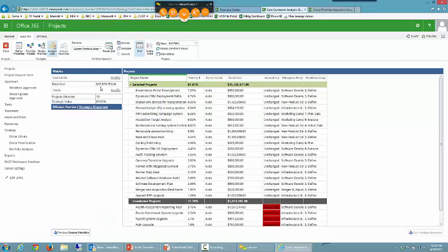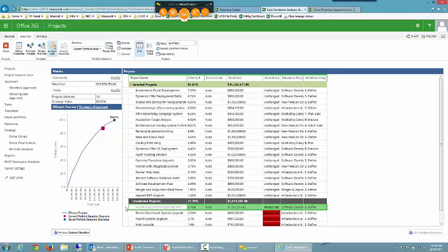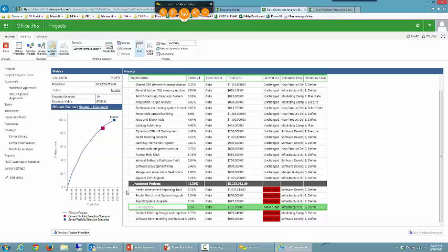So if I do truly only have $15 million to do whatever projects I can do, put that figure in, and it's automatically, unless I have some zero cost projects in there, which I don't, going to say, based on trying to maximize this efficient frontier curve here, I'm going to recommend that you don't do these projects down at, actually more than 4. So out of 25, now we're down to 19, these 6 projects down below.